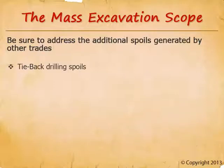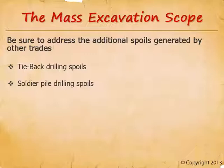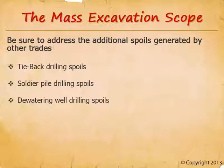Tieback drilling spoils: we need to coordinate the length, diameter, and quantity of tiebacks between the shoring and excavation bidders during the bidding phase. Soldier pile drilling spoils: soldier piles are commonly installed by one of three methods — driven, vibrated, or drilled. If the piles are driven or vibrated, there are no additional spoils. But if they're set in drilled holes, there are additional spoils. We need to coordinate the shoring methods with the excavation bidders during the bidding period, and they need to know the depth, diameter, and quantity of these drilled holes. Dewatering well drilling spoils: dewatering is traditionally a design-build trade, so these won't be on the drawings. Nevertheless, the excavation bidders need to know the depth, diameter, and quantity during the bidding period.